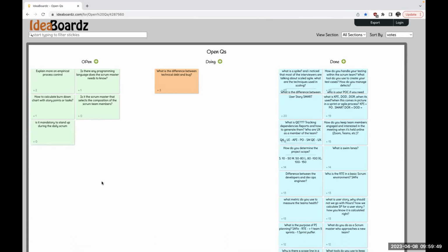Okay, let's say that we finished the story and the feature and pushed it to a higher environment, whether production or testing. We closed the story and the sprint and said we're good. Now, a user found an issue with the same functionality that we built two weeks ago. How are we going to log this issue? We'll create a bug, and this bug will go to the backlog of that team. Usually it should go to the PO and the tech lead, and the PO will give it priority, whether it's something really hot that must go to the sprint now because our website is down, or something we can fix next sprint. So that's a bug. Any questions on the bug?